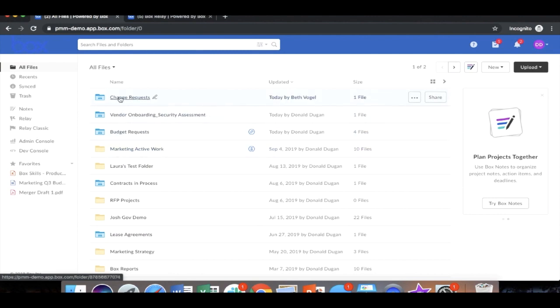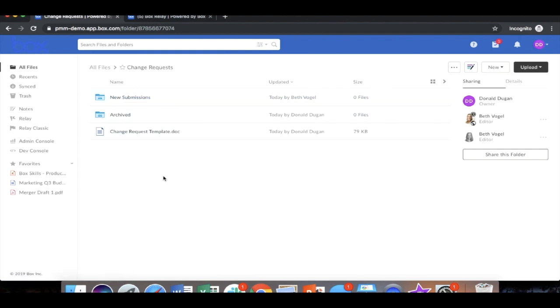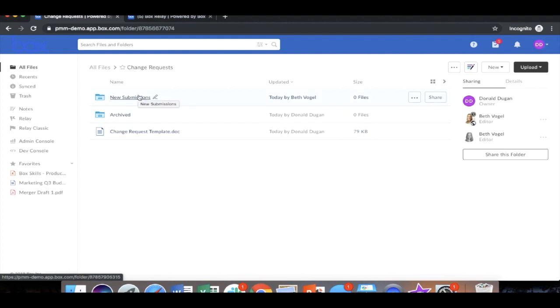Going in, you see that there is the change request folder. This is the process we'll be using for the document review and approval process for these lab equipment changes. The process is as follows: when someone makes a copy of the change request template, they must then make updates to that template and modify it. Once they've made changes to that change request form, they're going to submit that to the new submissions folder.